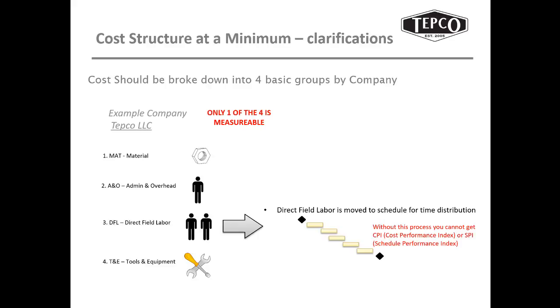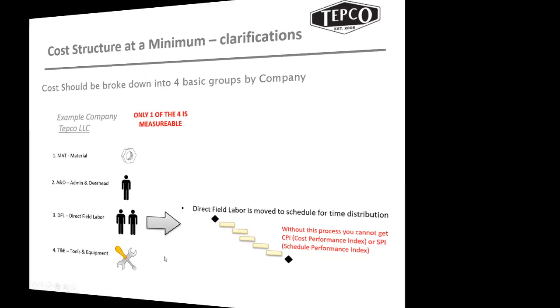But the thing that we're really looking at, from a forecasting and cost perspective, is the ability to do what we call a cost performance index. Are they earning the hours per day per shift based on the time that they're charging me per day per shift? So we're measuring the progress and seeing the earned versus the burn, and the earned versus the baseline schedule, to see if we're going to finish on time.